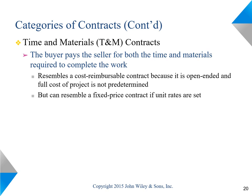Time and material contracts reimburse the seller for all the costs of labor, time, and materials used on the project, making them similar to reimbursable contracts. However, in many time and materials contracts, the unit labor or unit material costs are fixed, which also makes them similar to fixed price contracts.